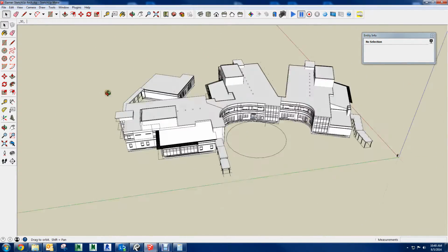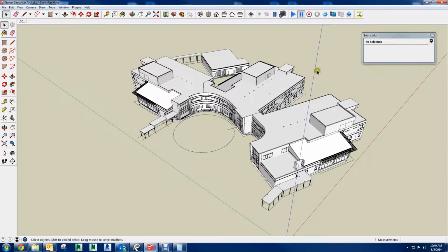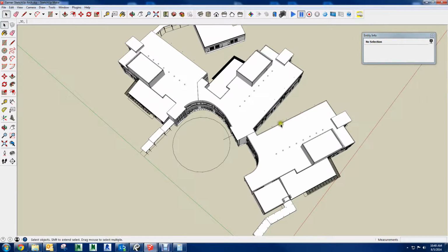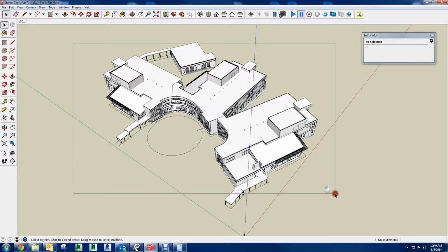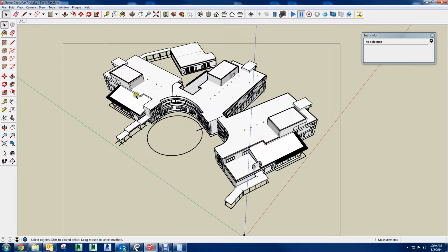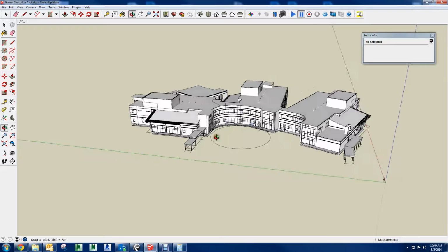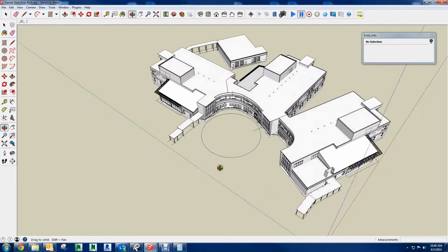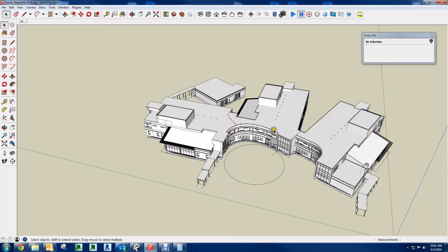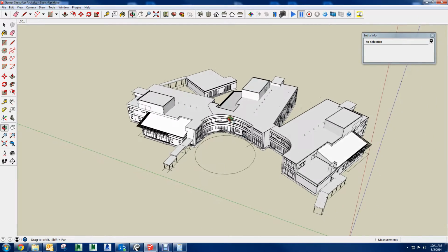However, for the purpose of the site logistics plans, there's no value in it. If I bring the Revit model into my site logistics plan, you're going to increase the size of the file by a hundred-something megabytes and make it really slow. We prefer to have generic forms. Yes. I used to go crazy on it and be very detailed about it. Never used it, so I just stopped doing it immediately. I just spent too much time doing it.